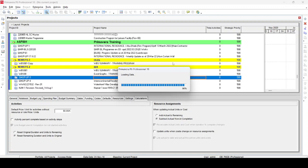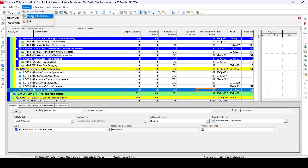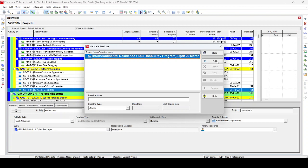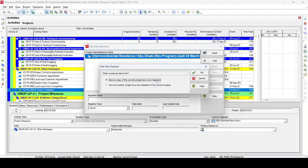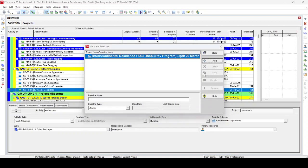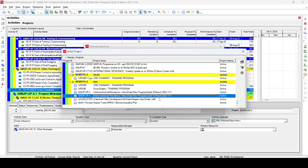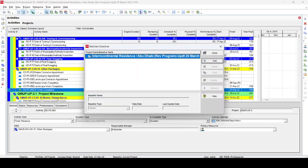Once the 20 March program is open, we need to assign the baseline. We go to Project > Maintain Baseline. In the Maintain Baseline dialog, we click Add and again we see the two options. We select the second option: 'Convert another project to a new baseline of the current project.' We click OK and now we see 20 March and 13 March listed. We select 13 March because this is our previous week's update — since this is a weekly report, we use the previous week's update. For a monthly report, we would use the previous month's update. We select the 13 March updated program and press OK.